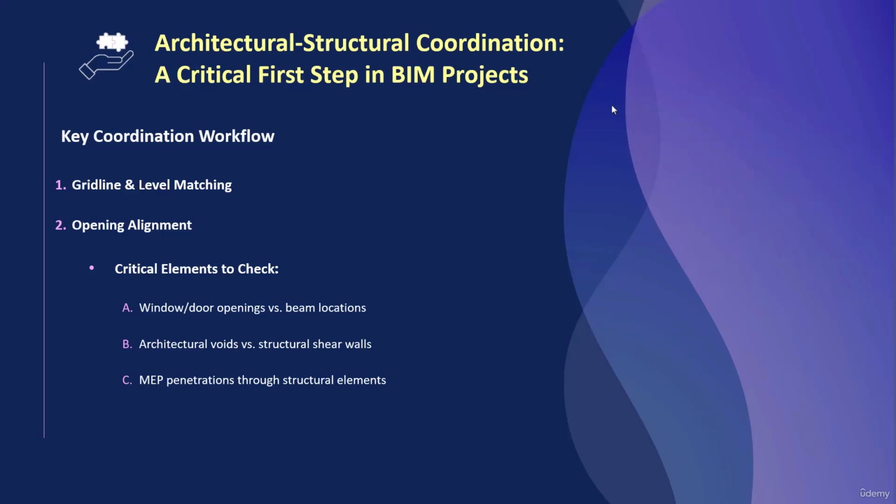The most important thing you should check in this process are the architectural and structural references. Usually in our projects, we see a lot of interferences between the architecture and the structural plan. You should report these so that they will tell you which plan to put on top. Usually they tell you to put the structural plan on top, since those are the established plans. But there have been projects where they told us that the architecture plans go on top.